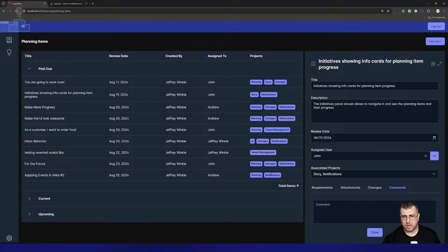So if we're talking about small commits, if we're talking about little pieces of work, then it does make sense to break the stories up as they fit into a component of the system. But if you're saying, okay, well, a story should have user value, well, when does user value happen? User value only happens if I can add a comment, then refresh the screen and see the comment.